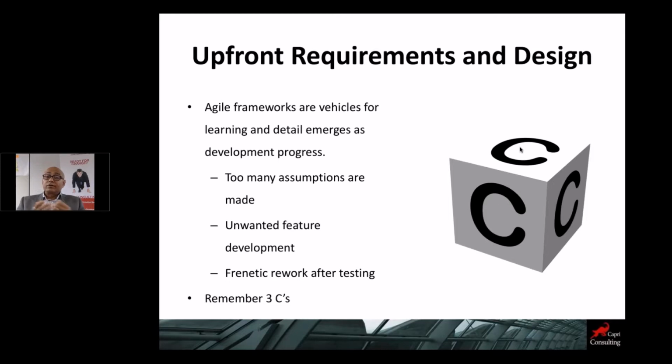The 3rd C is confirmation. Once you have had this conversation, on the back side of the card, just write all this acceptance criteria. That is a confirmation of what you have discussed. So you've already had a card which had just one liner, that we had conversation, then you had confirmation of that. That's all you need for your designing and requirements gathering. And then you can move on and start actually designing a product based on that conversation.